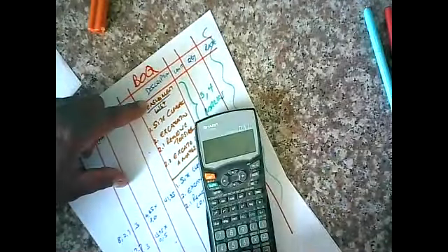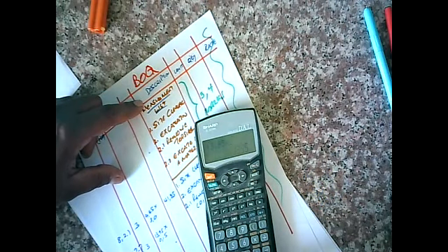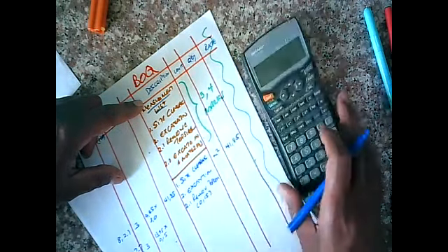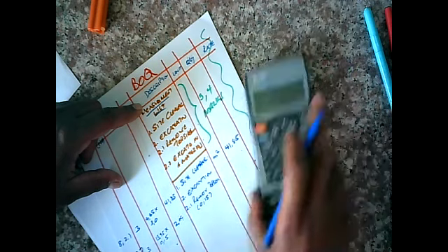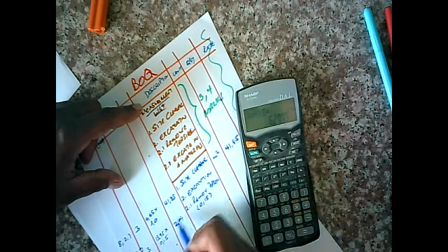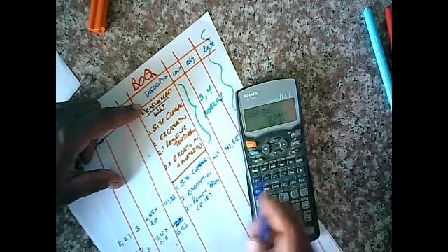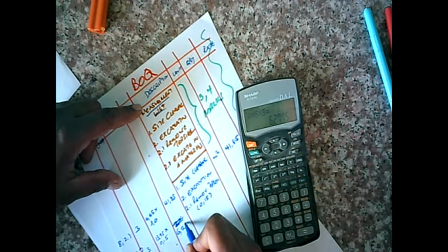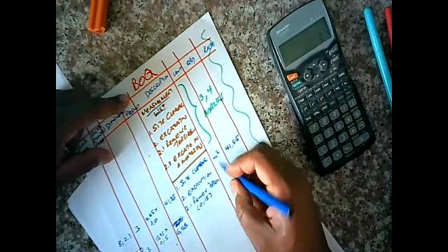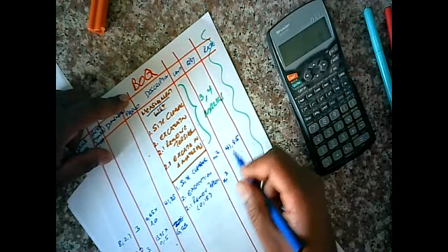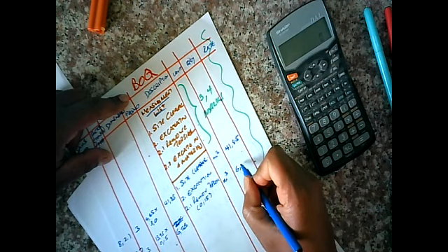So this is 13.95 times 0.15, and we're getting 2.09 times 3, 6.28. And what is the unit here? Meter cubed, as I've already explained, and our volume there is now 6.28 meter cubed.